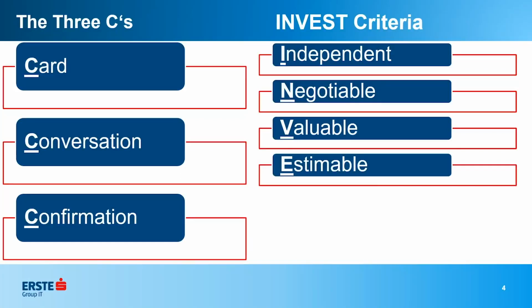So the team should be able to have some idea of the size of the story, right? Even if your team doesn't do estimates right now, if they had to say this is small, medium, or large, just if your team has never done estimates before and they're refining a story, at the very end, you should be able to say, okay, compared to everything else in the backlog, do you think this story is small, medium, or large? And if somebody says small and someone says large, there's probably still some discrepancy and some questions that need to be answered about that story before you move forward.